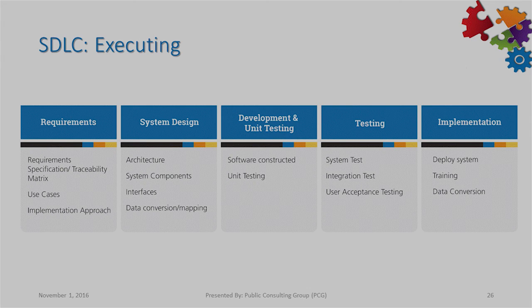Finally, testing, which includes system testing, integration testing, and user acceptance testing. While I'm sure you are all aware of system and integration testing, I want to talk a little more about user acceptance testing, because this is a very critical feature. It is here that the clients, stakeholders, and the end users themselves are allowed to test the system. It's here that they check to ensure that their expectations from the system have been met, and the system is able to perform in real-time scenarios, as they had portrayed when they came up with their requirements in our very first phase of requirements gathering and elicitation.